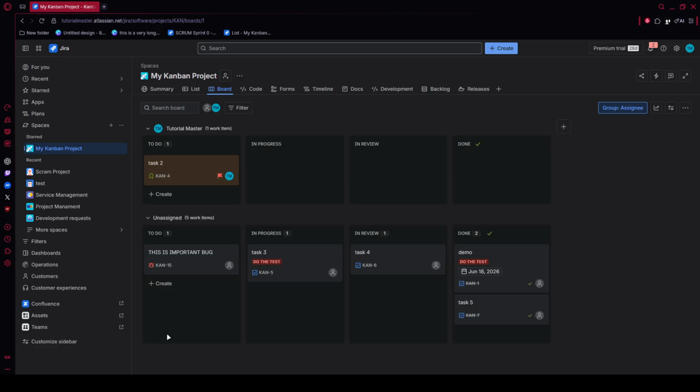To preserve history properly, each comment cell should follow Jira's expected structure. A timestamp, then a username, then the comment text, separated by semicolons. After that, save the file as a CSV so it's ready for import.